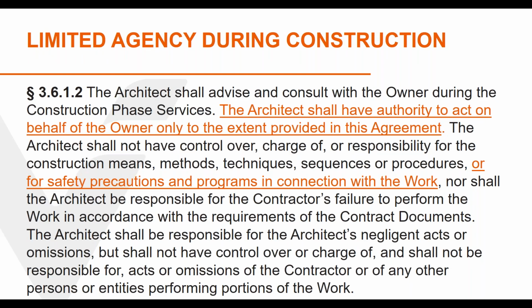In this one, the first highlighted provision establishes the architect as having a limited form of agency on behalf of the client. Being an agent of the project owner means that the contractor and the contractor's employees have no or very limited rights against the design firm. The action has to be brought against the owner since the owner is responsible for the acts of its agents.